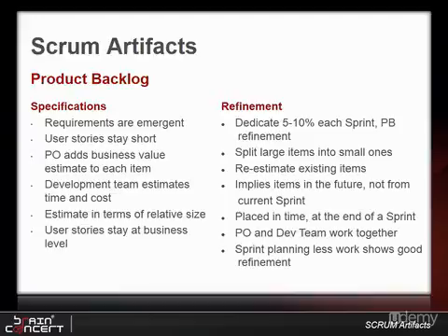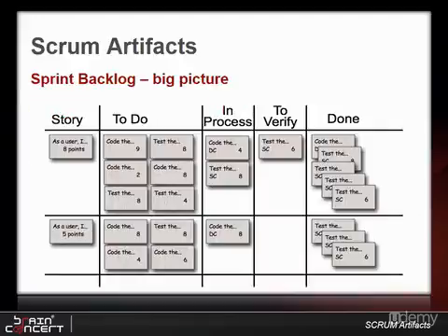Also, the product owner can make refinements of the product backlog by using some of the right techniques. Most teams will know the sprint backlog as the task board, which is the physical representation of the list of work they have committed to do during the current sprint. The task board is an example of a Kanban, a Japanese word meaning sign or visible signal. It tells the whole team and anyone else what work they have planned and their current status.